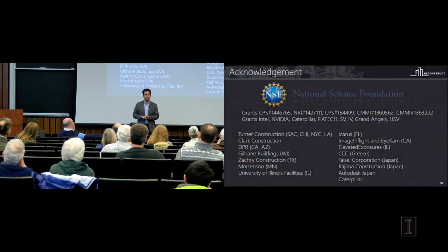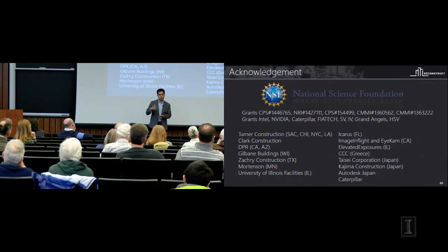The most challenging ones are when you're close to an airport. So we are about to get engaged in the LA Rams Stadium project. It's $2.6 billion, which happens to be really close to the airport. And as part of that, they've even had to pay $60 million to relocate one of the telecommunication towers at the airport because of that project. But we've gone through a different process for that. It takes somewhere between 3 weeks to 3 months to get a special permit to operate within the proximity of an airport.